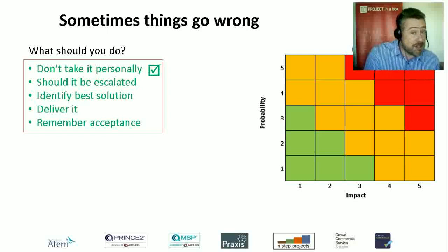In that case, you need to report it, or you might have a load of small ones, and in combination they're going to push out your costs and timescales, so you need to report that. So you need to be aware of whether you need to report these things or whether they lie within your tolerance to just get on and deal with it.